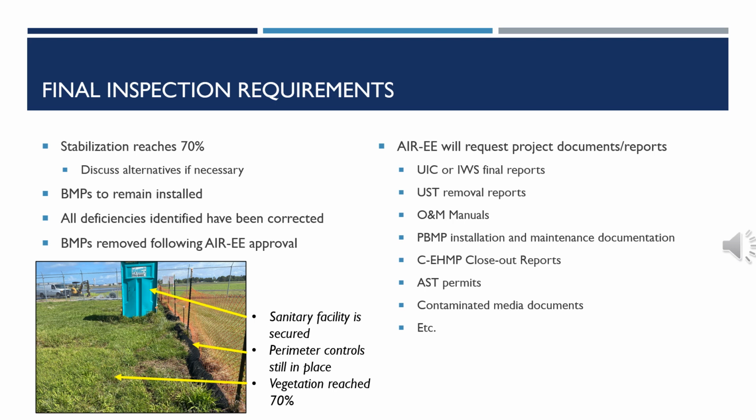AIR-EE will request any necessary documents and reports, such as but not limited to UIC or IWS final reports, UST removal reports, O&M manuals, PBMP installation and maintenance documentation, CEHMP closeout reports, AST permits, contaminated media documents, etc.